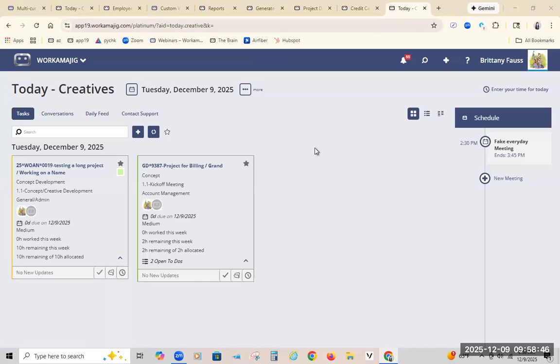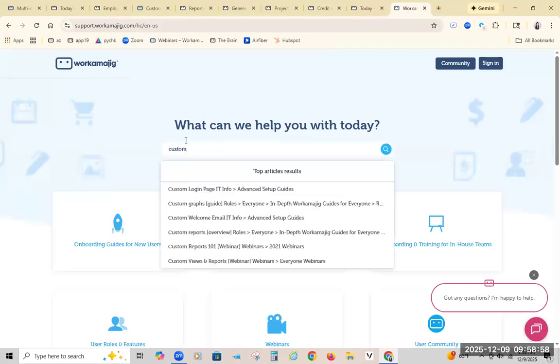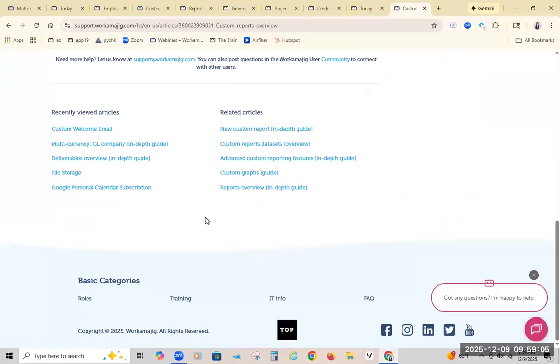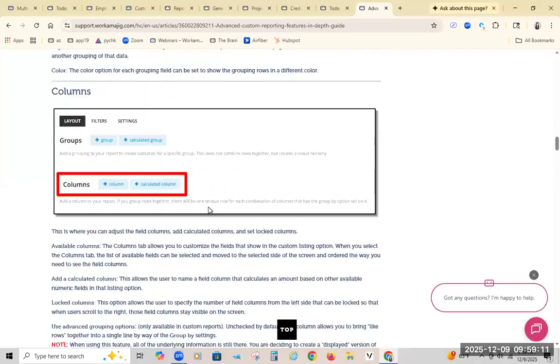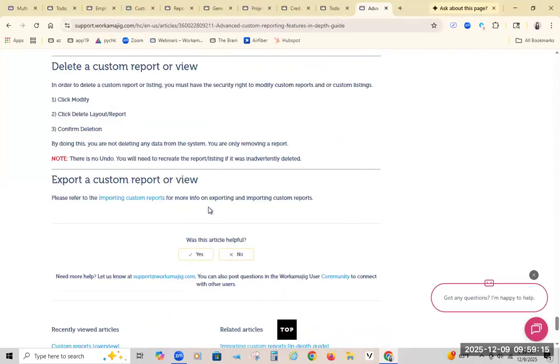So again, the idea of that one is after the fact, you're kind of running it for either that client or that project. And the idea was just to see what happened. And it's actually formatted to show every task in order and say, what was my budget on that task? What was spent? How many hours were supposed to be on it? And did it start on time, end on time? That type of thing. And I believe we have that as one that you can export.